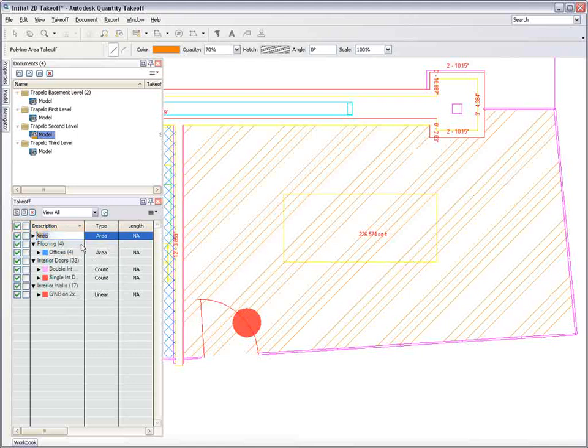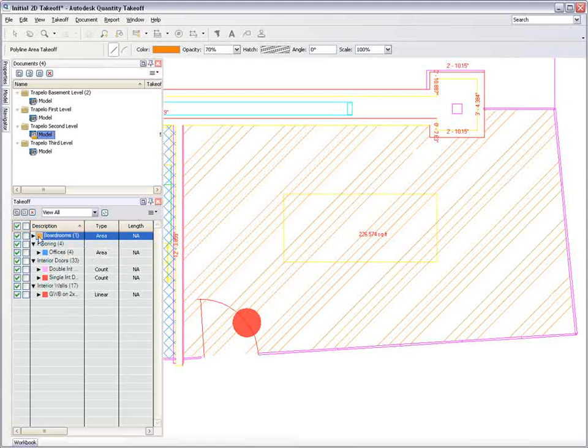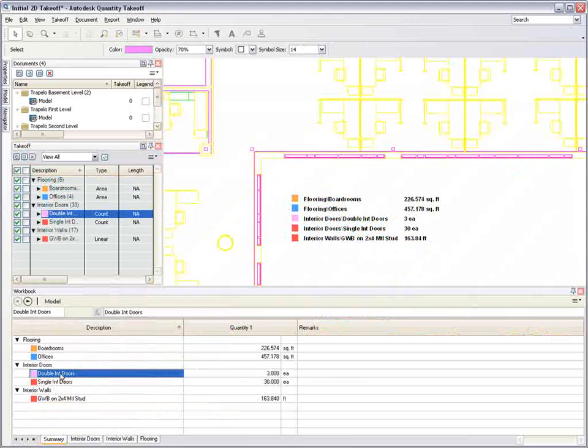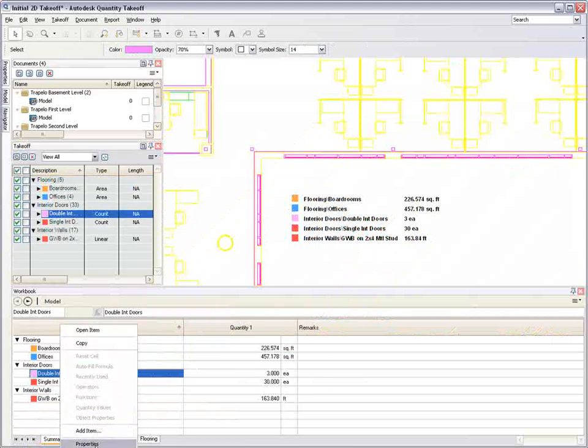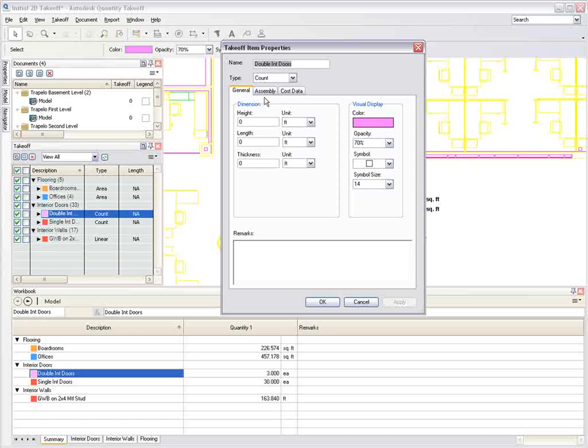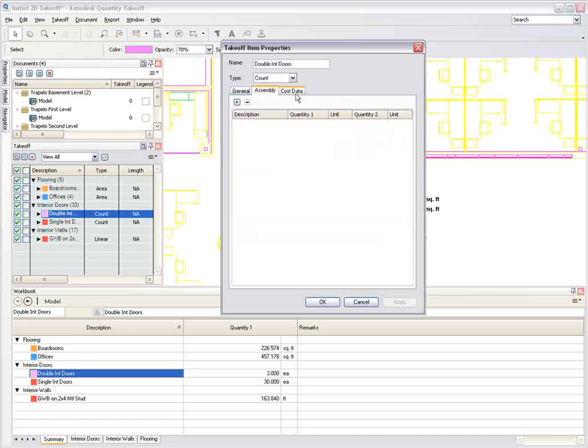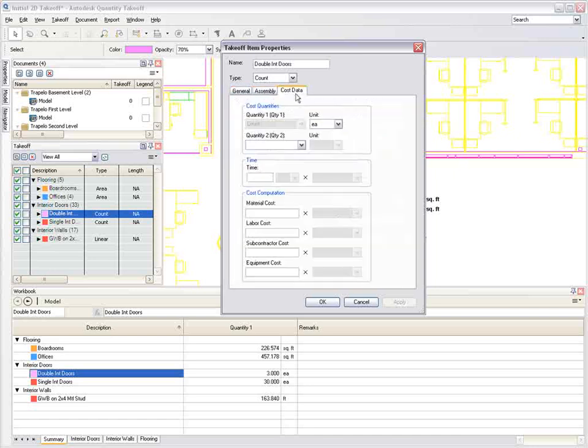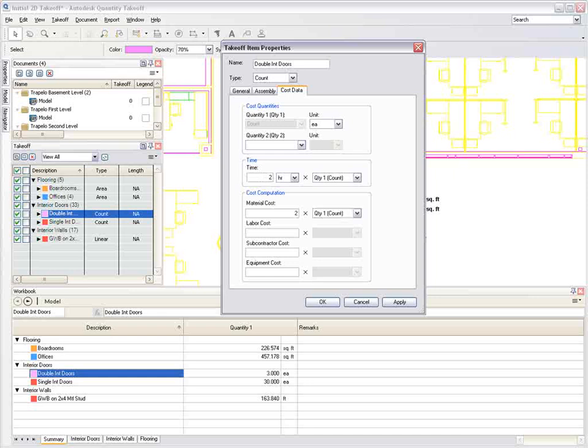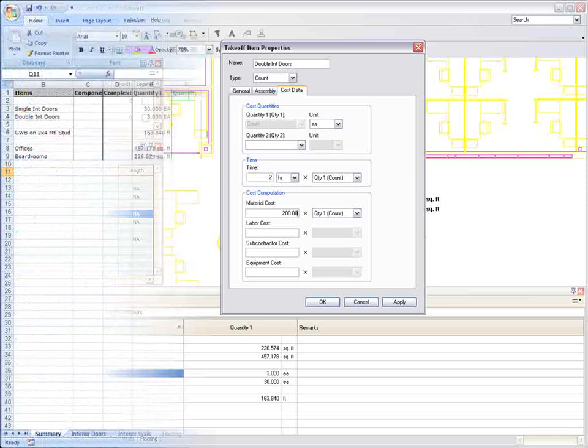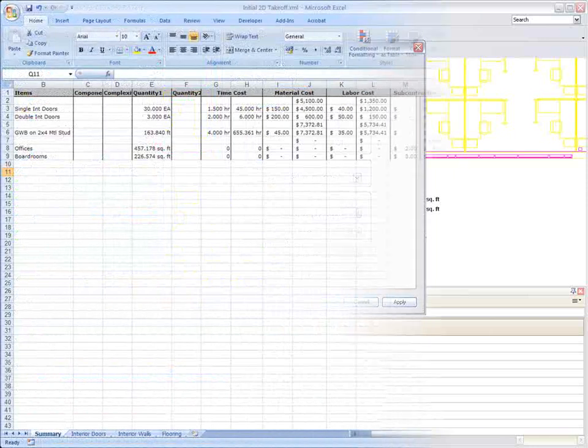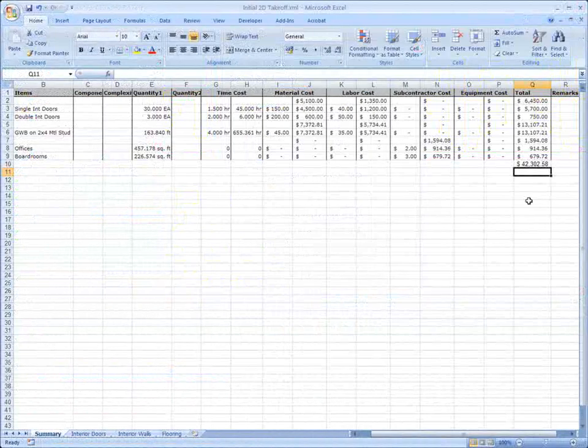When carrying out the quantification, the workbook is also being built out providing another view of the building's components. The workbook allows you to add initial cost information against each takeoff group including material and labor costs or flat fee subcontractor costs as they become available. Reports can then be generated directly from Autodesk Quantity Takeoff and quantities can be exported to applications such as Microsoft Excel.